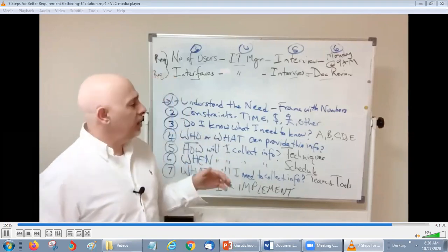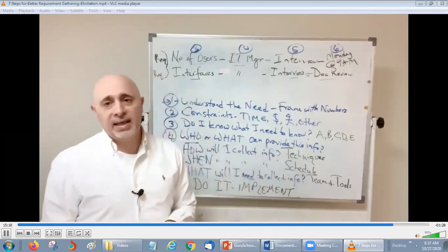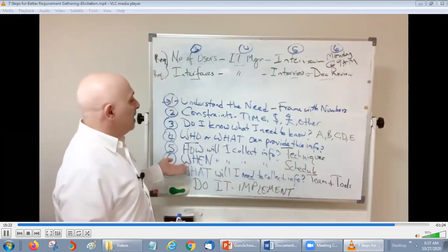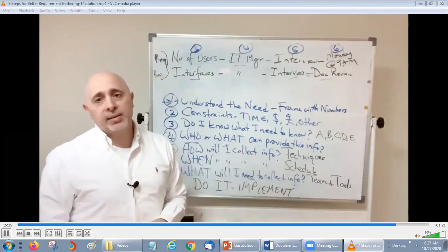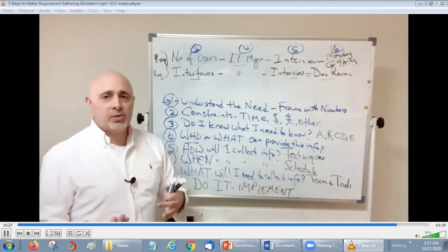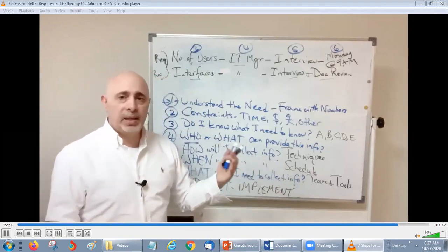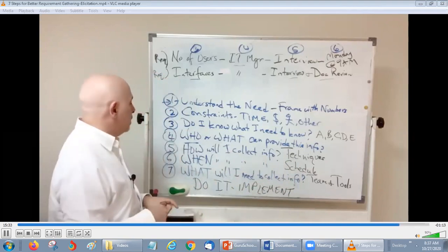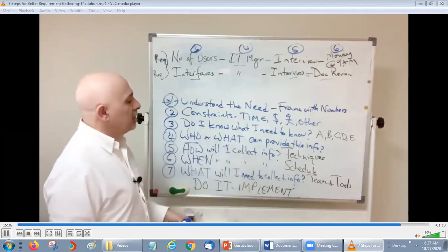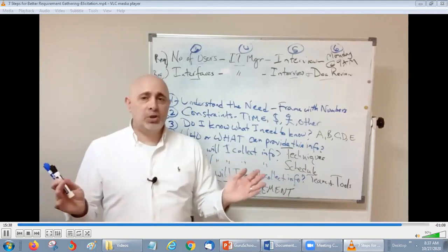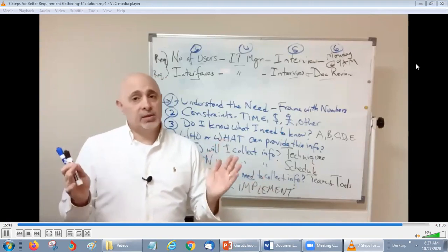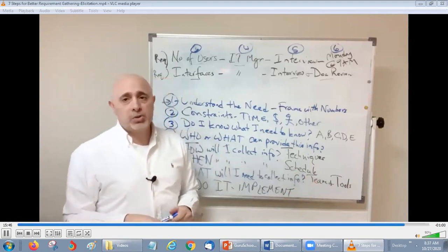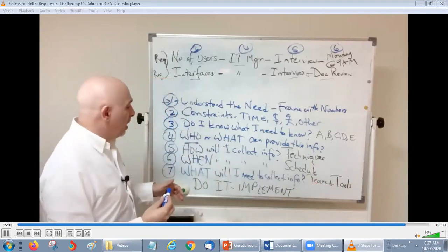this information? And this could mean figuring out different techniques that would work for different instances and different pieces of information. Then schedule time to go and collect this information through interviews, brainstorming sessions, workshops, prototyping sessions, or maybe by doing benchmarking and market research. And then once you develop the schedule, if you're trying to make it fit within a specific time frame, then ask yourself if you will need additional team members or if you need specific tools to speed this up.